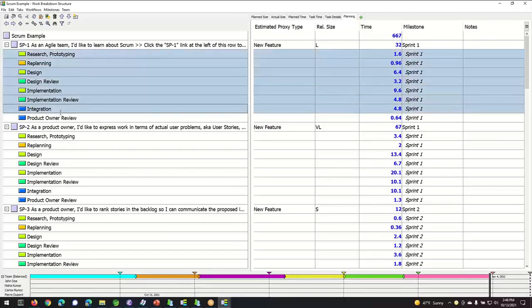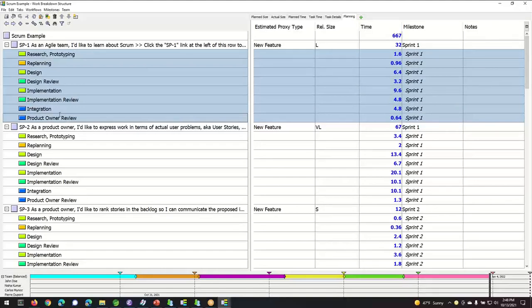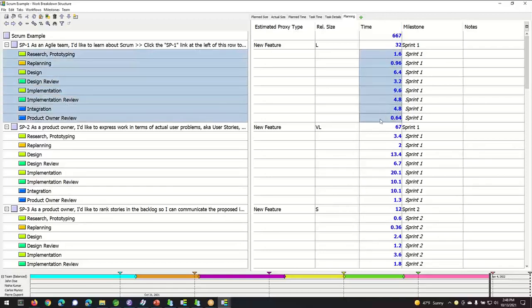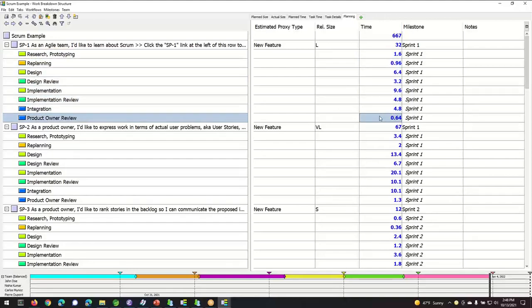This breakdown is really useful because it gives us better insight into the progress and whether we're ahead or behind. Sometimes, for example, it might take you most of a sprint to get 32 hours worth of work finished. But because these subtasks are smaller, you can see progress along the way and see whether or not you're on track to burn down all of this work by the end of the sprint.